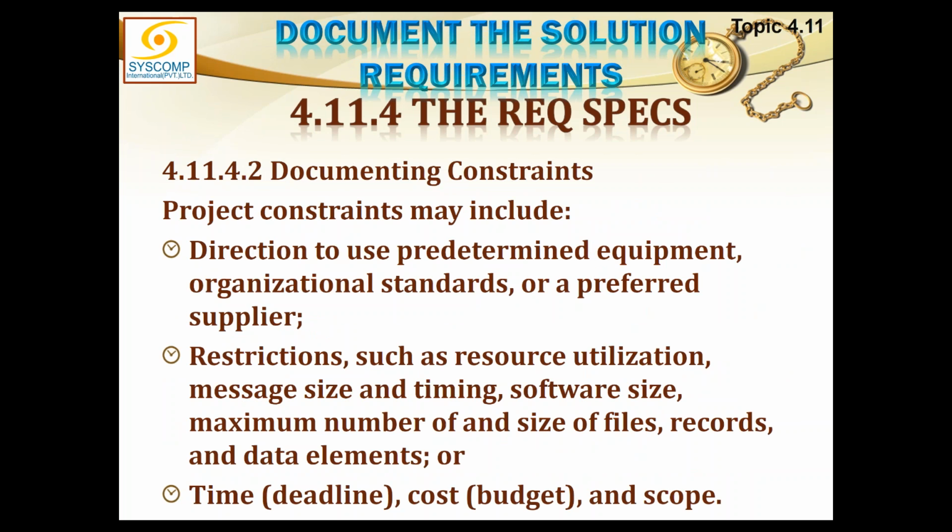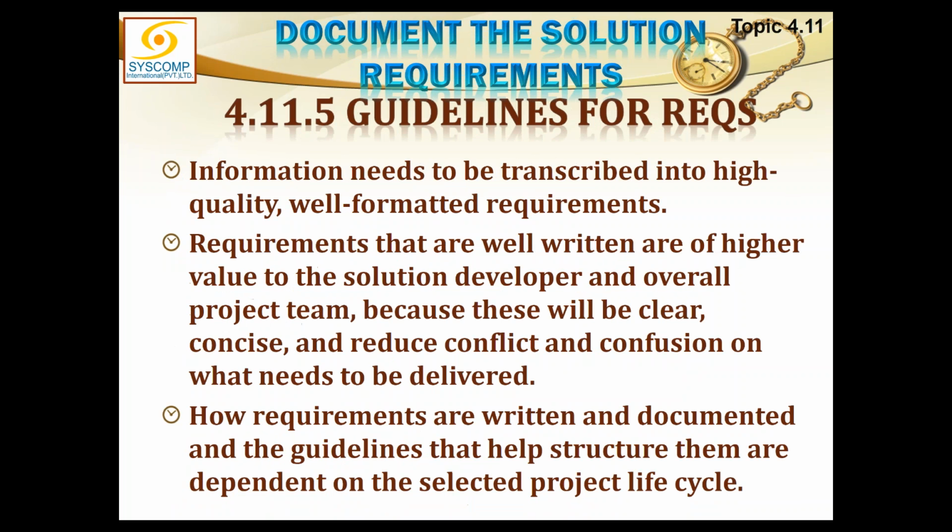Project constraints may include direction to use predetermined equipment, organizational standards, or a preferred supplier. This is within the project. These are the project constraints. Your project may be constrained by the fact that a specific kind of equipment or standards or the supplier are mandatorily to be used. Restrictions such as resource utilization, message size and timing, software size, maximum number or size of files, records or data elements, this could have been specified. Time could be a deadline. Cost, budget and scope, these could provide some kind of constraints.